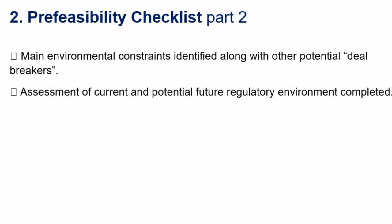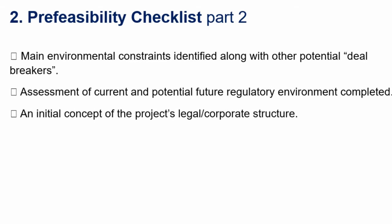Sometimes if you have a power purchase agreement in a foreign country, it's usually paid in local currency. If there's a chance of high inflation, the money you get isn't worth as much. Sometimes there's an inflation compensation, or you fix the PPA in euros. An initial concept of the project's legal and corporate structure — usually you form a company for the power plant, which is easier to sell, making one package of the plant and the ground and selling it together as a company. Usually taxes are lower that way. This is usually called a special purpose vehicle.